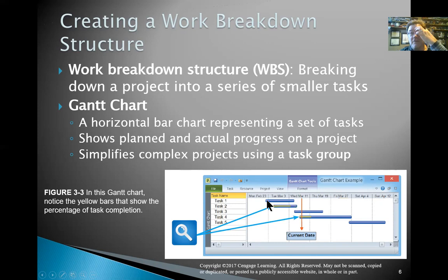And then this part in here indicates what has actually been completed. So hopefully you're in line with your developers and you know what has been completed, and then roughly where are you now? A quick gasp on this one, just so you know, is that this chart is not indicating good news. Just a little bit of good news because we're apparently ahead on task four, but we haven't even started this task, which was supposed to have been finished by now. We were supposed to have at least some of this done by now. So this is actually a bad news Gantt chart.